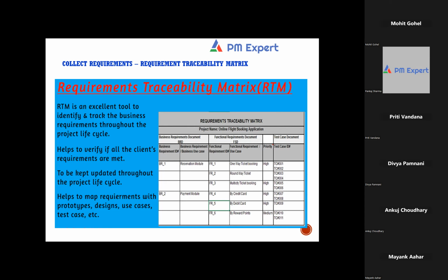For example, can you see that requirement is mapped to multiple test scenarios here? Now this ensures that you have properly tested the requirement also. But having test scenarios right in the beginning is going to be a little difficult, right? I mean, practically. You can't develop the entire requirement traceability matrix in a single shot. It should be done over a period of time.